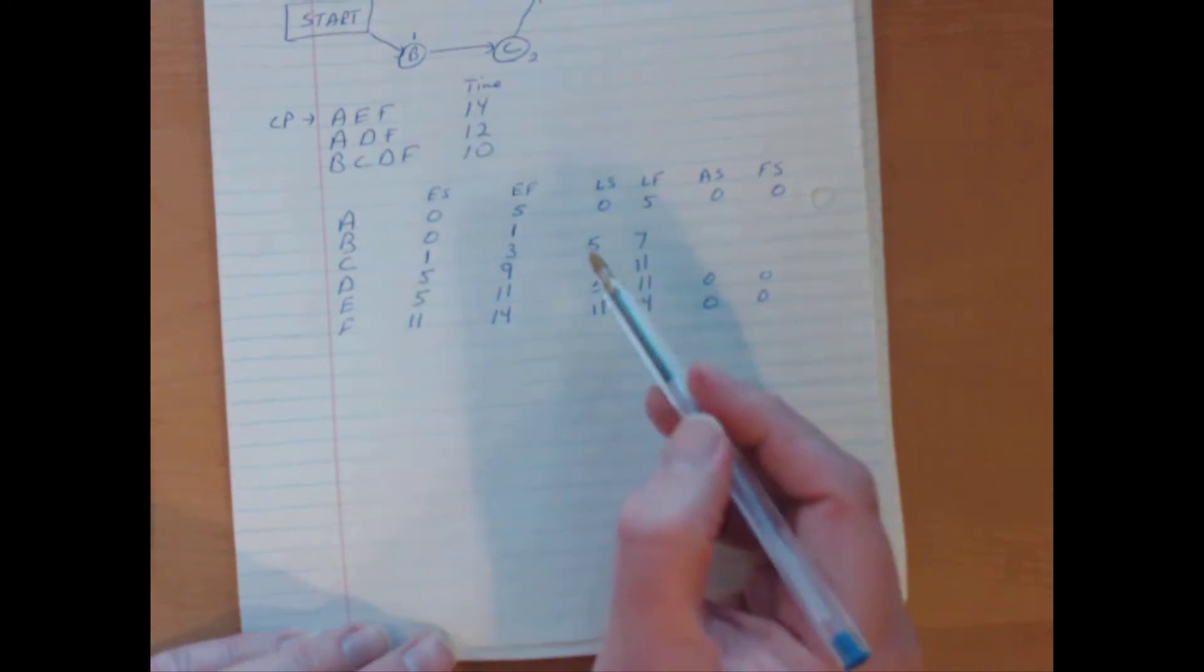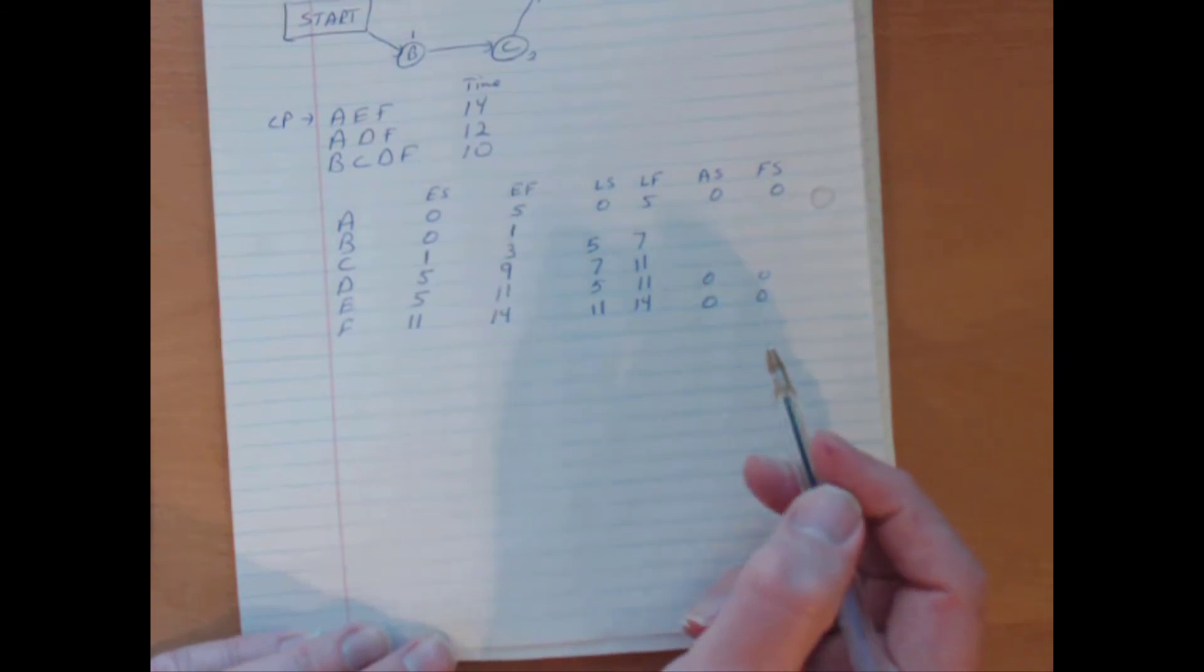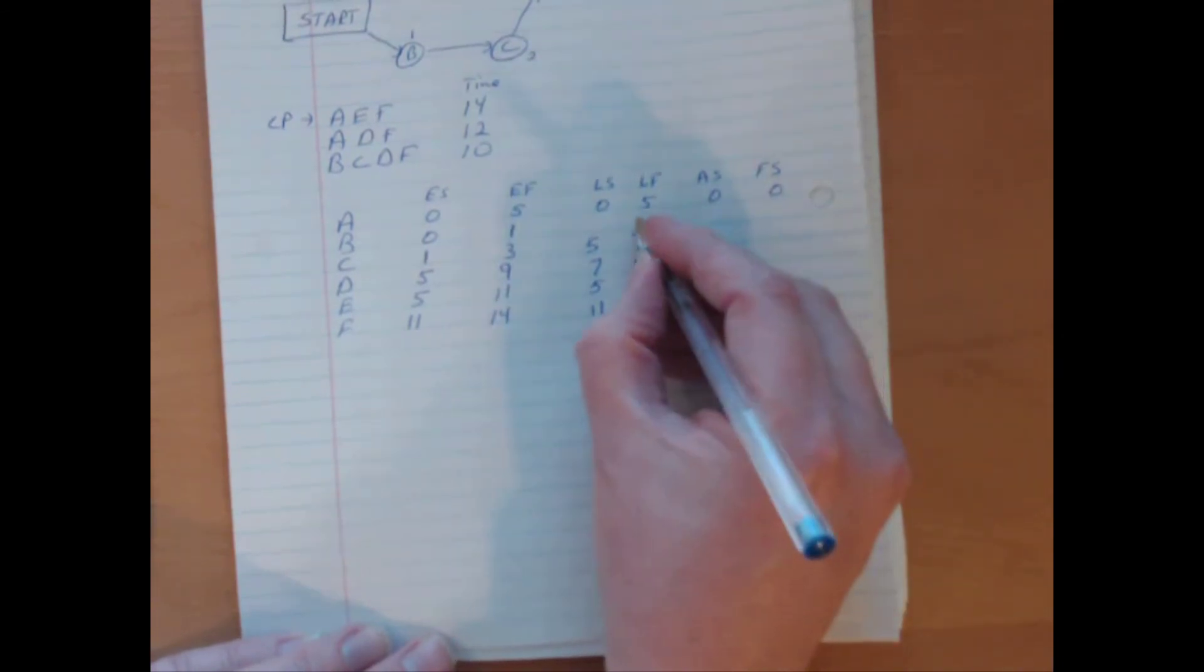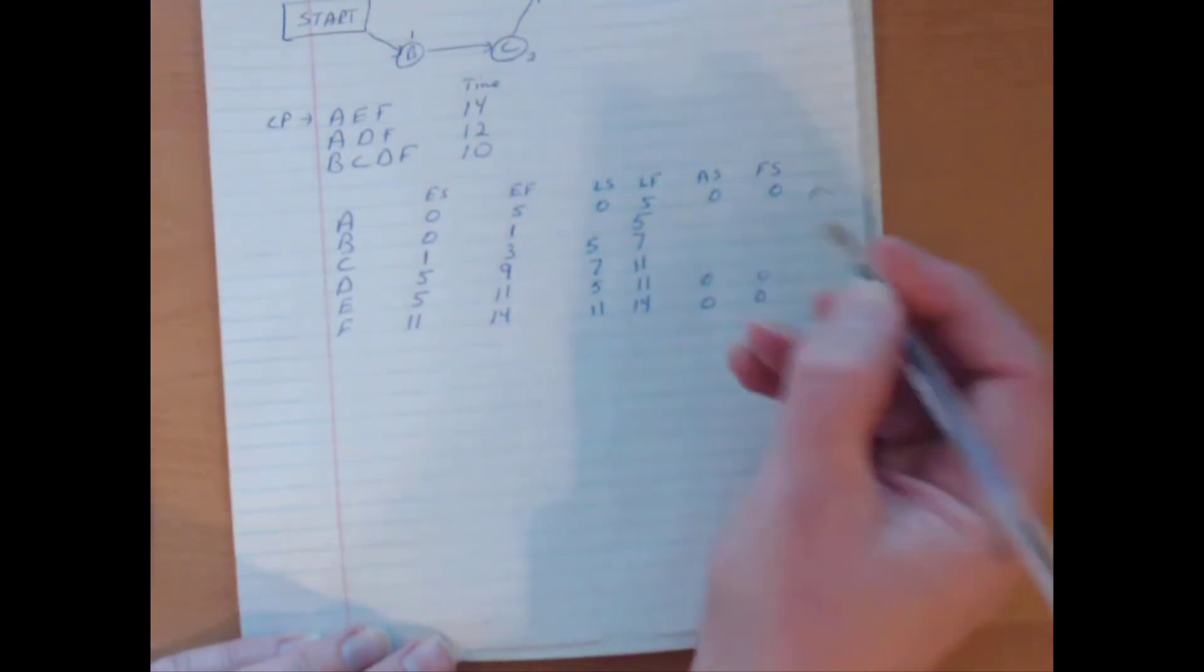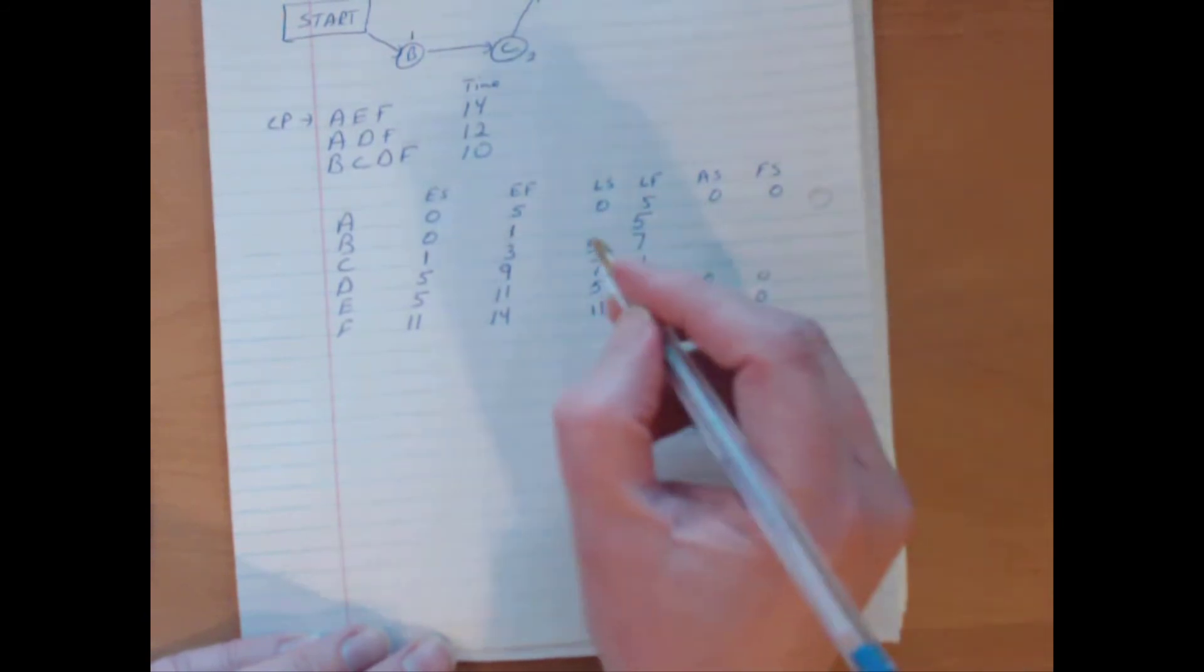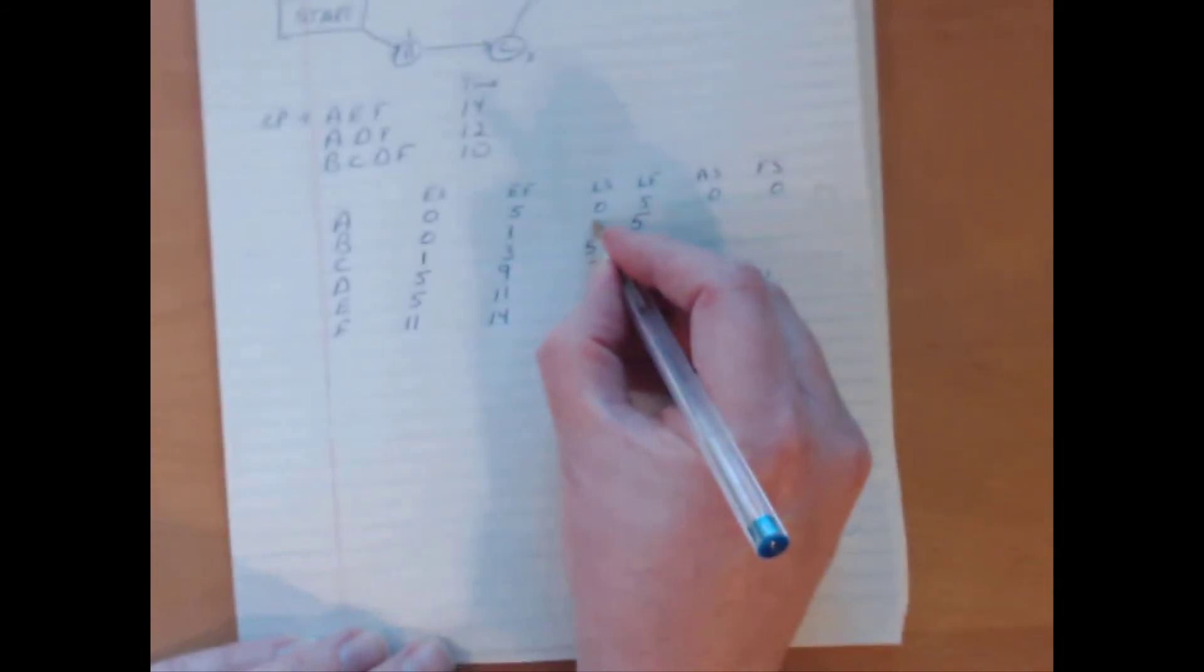And then lastly, we go into period B. C depends on B. C can't start any later than period 5, which means that B has to finish by period 5. And then B takes one period, and so B has to start no later than period 4.